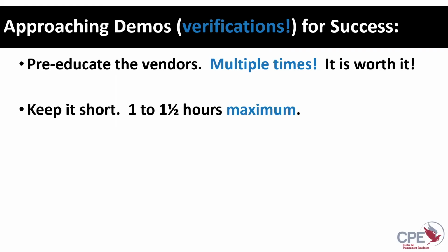You have to keep it short. Can't expect a ton from a peer group to devote an entire day to go through this, free of charge, so to speak. Everyone's usually pretty happy to provide a reference, but you start making it onerous on them and it's going to decrease participation. So keep it short. We like to say an hour, maybe an hour and a half maximum.